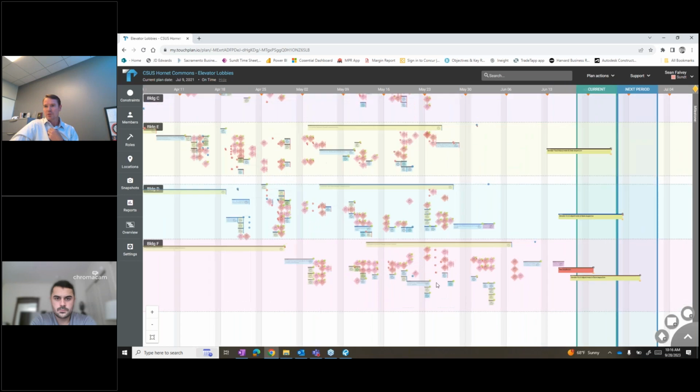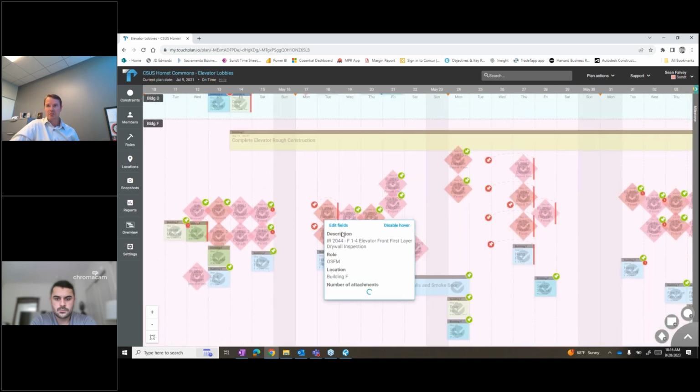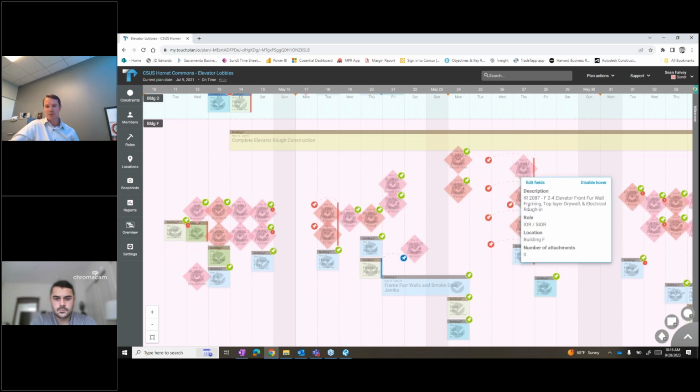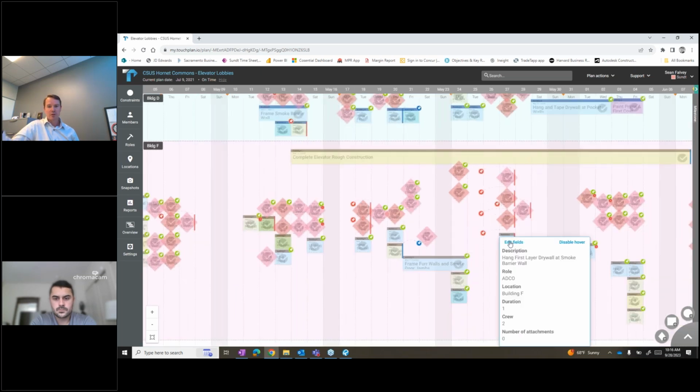But when you zoom in there, we do things like this. This inspection would either pull back or push to the next day. We'd move things around because we had that ability to do so. And then we'd have to adjust the construction activity. All that information was live to our trade partners and allowed them to have a much better projection of their manpower and not feel like they're constantly being surprised the morning of. They know the evening or day before, hey, we didn't get that inspection, so tomorrow I'm going to need to send my guys somewhere else.